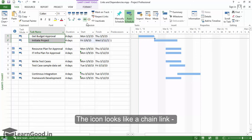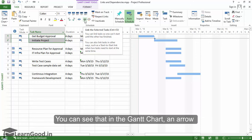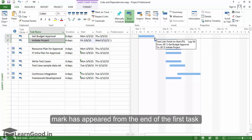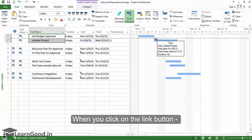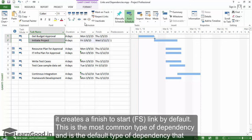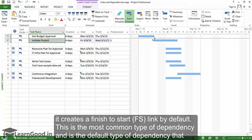The icon looks like a chain link and does precisely that — it creates a dependency between the two tasks. You can see that in the Gantt chart, an arrow mark has appeared from the end of the first task to the start of the second task. When you click the Link button, it creates a Finish to Start (FS) link by default. This is the most common type of dependency and is the default type that project uses.